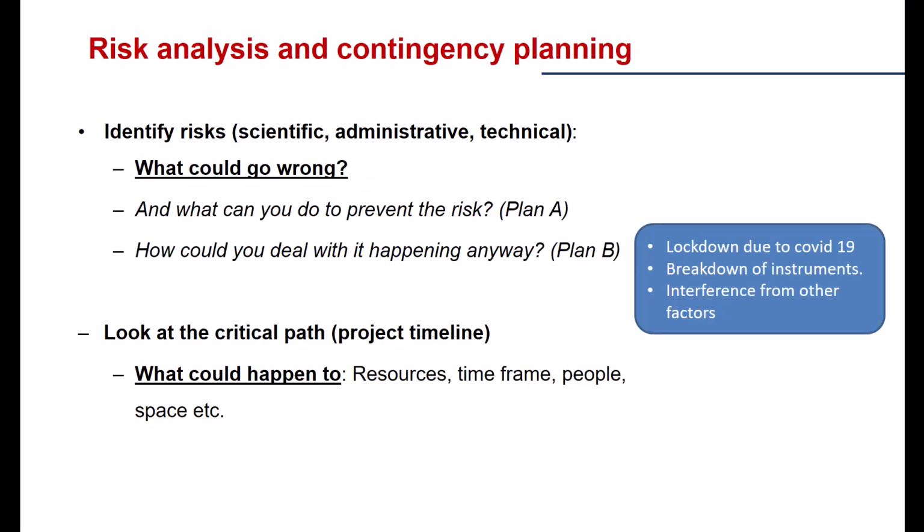Another area that is frequently asked is the risk analysis and contingency planning. So here you want to look at the critical part of your project, so the whole project timeline, and try to evaluate what could go wrong, what could happen to resources, to time frame, to people. So for example, if somebody quits the job, what is the contingency plan to continue the project?